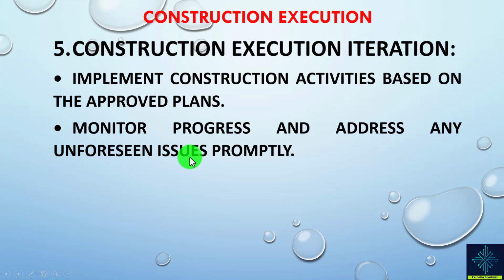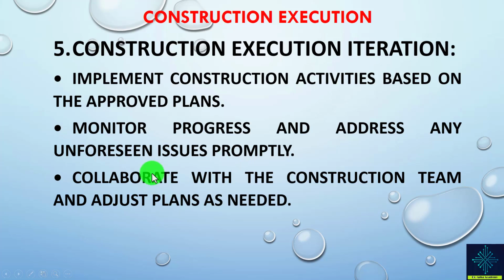We have to have an issue log, and we have to keep monitoring this log strictly, and we take prompt actions whenever issues arise. Then collaborate with the construction team and adjust plans as needed. These are the updates that might arise because of the concept of progressive elaboration.